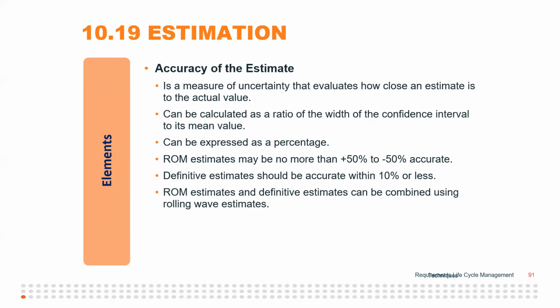Okay. All right. Now, obviously, the accuracy of the estimate is very important. I'm sorry, what is the key to knowing that it's a PERT estimation? Oh, that there's 3 different estimates at least. That there's 3 different estimates. That's what it is. There's 3 numbers. And then it's PERT.